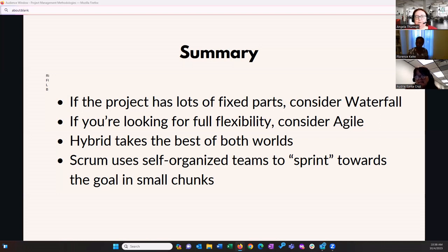And then you'll start working on the statement of work, the project management plan, the communication plan, the risk management plan, the material plan, just a plan for everything. And then start working on your work breakdown structure and from that creating your schedule and your resource planning.